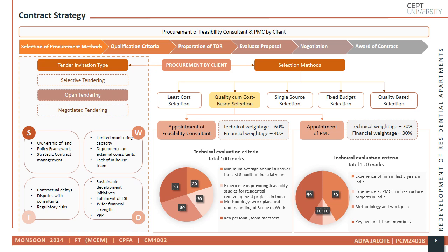the project management consultant. Technical evaluation criteria include the consultant's annual turnover, experience in residential redevelopment projects, and the methodology proposed. Key personnel and team composition also play a significant role in the selection. This rigorous evaluation ensures that only capable firms are entrusted with critical responsibilities.